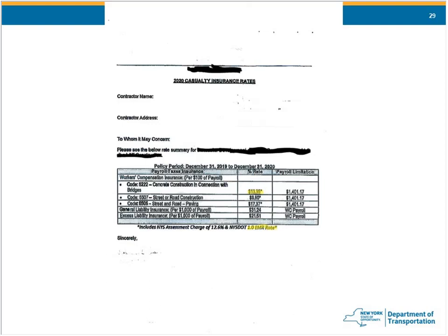There's no EMR issues with GL. So you just need a letter stating the rate, and that rate will sometimes be stated per 1,000 rather than per 100. So you just got to move the decimal point. You can go to the next slide, Amy.